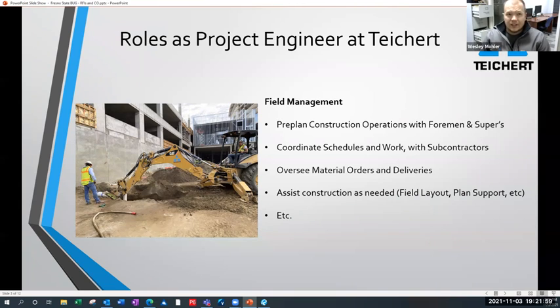Yeah, we have internal servers that run that program, and then we have several databases that are localized. One is for our resource side. So all of our superintendents for asphalt, grading and paving, right? They all have to manage their own schedules with their crews, giving different jobs to crews. And then the PMs have to manage a separate schedule for just the job at the job level. So the PMs and PEs use that program as well.